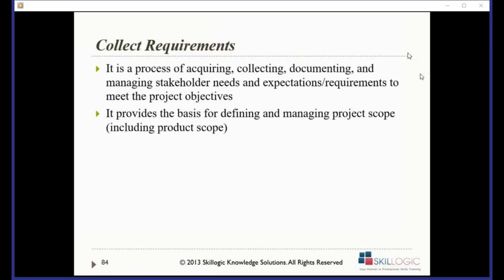As a group, you can do the discussions, come up with the decisions. You can send out the surveys and the questionnaire. What is the difference between surveys and questionnaire to the Delphi technique? Surveys and questionnaire might not be anonymous. You might still be able to gather the name who has given you the details.